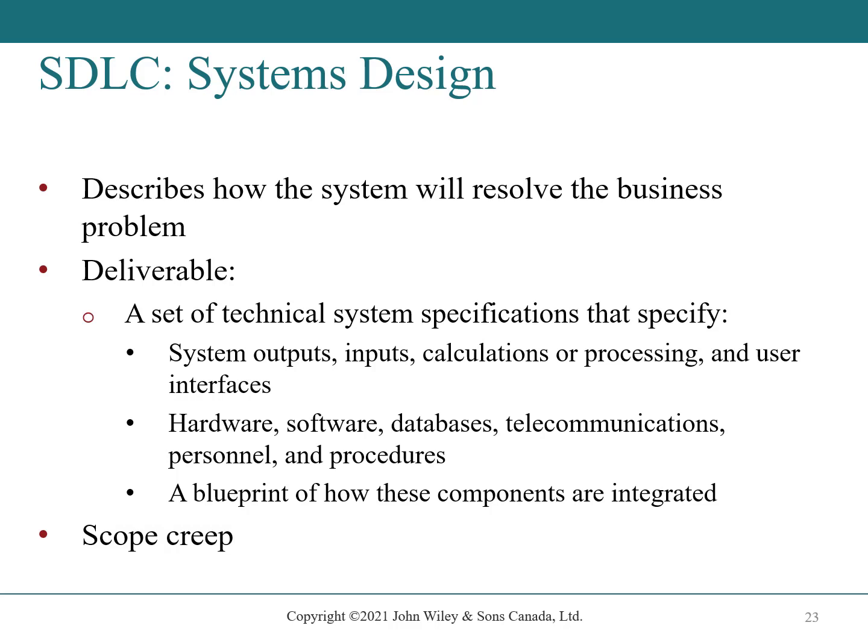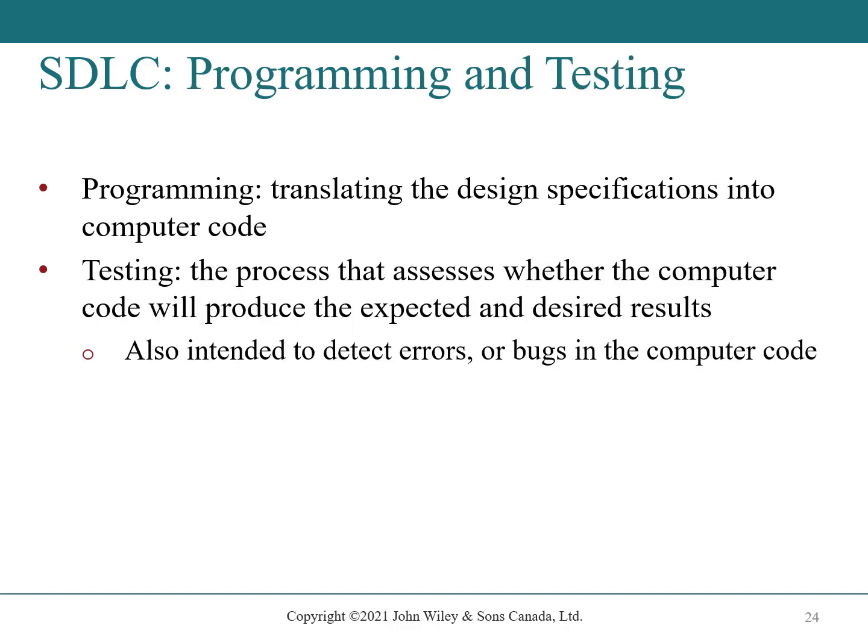Scope creep is the phenomenon of adding functions after the project has been initiated, which endangers the time frame and expenses associated with the project and expands them beyond agreed upon limits. The budget of the project and its schedule are therefore both endangered because scope creep is expensive, so successful project managers place controls on changes requested by users, and these controls help to prevent such runaway projects.